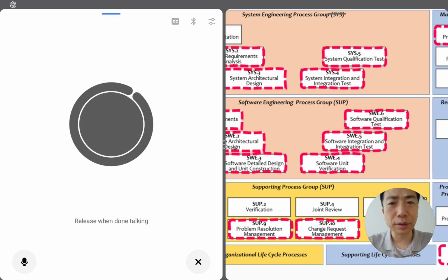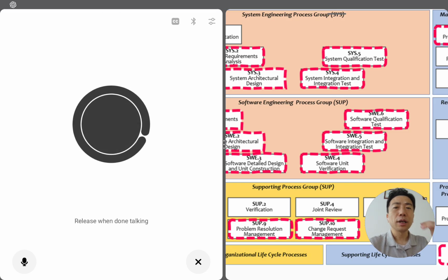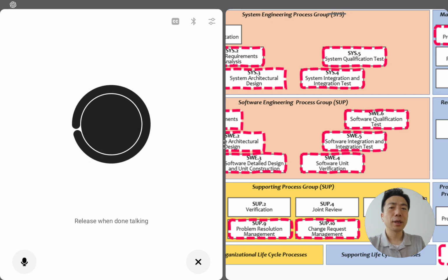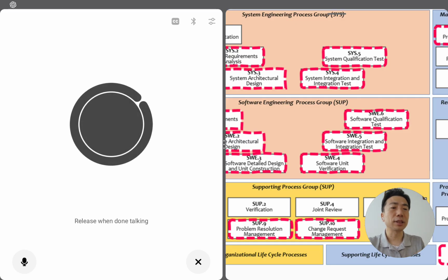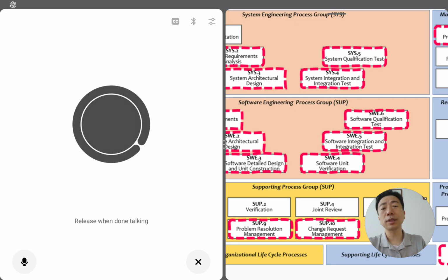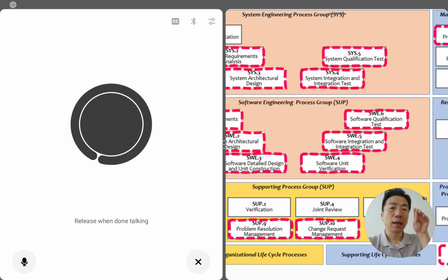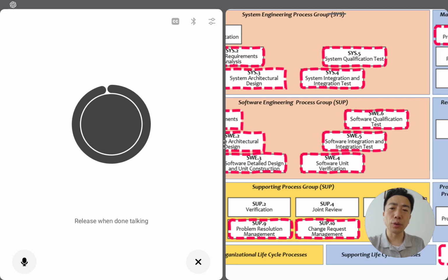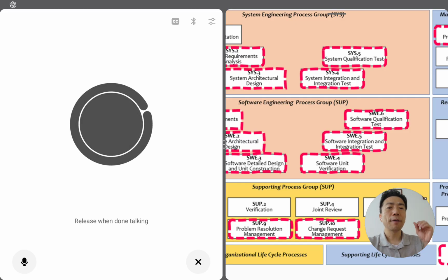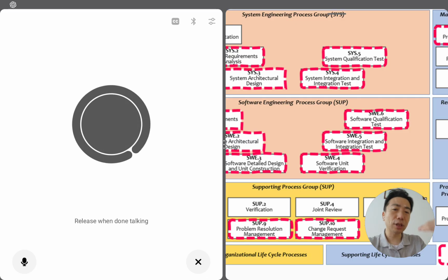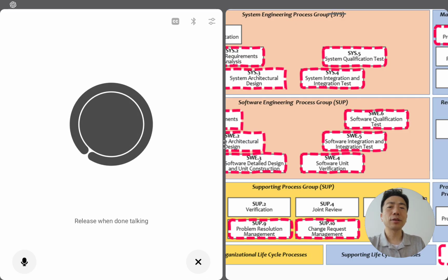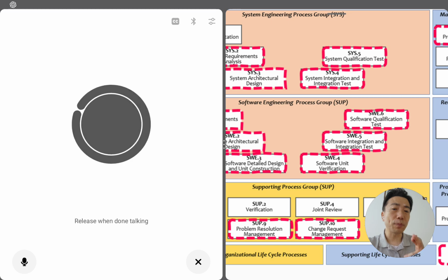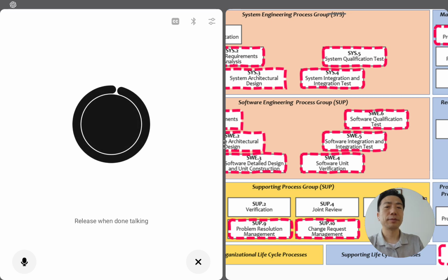Yes, that's exactly what I'm saying. Resolved only means the immediate problem is fixed and verified. The technical part is done. Just the technical part. On the other hand, closed means the whole process around it is finished too. Documentation updated, lessons learned captured, related actions like DFMEA or PFMEA also cleared.